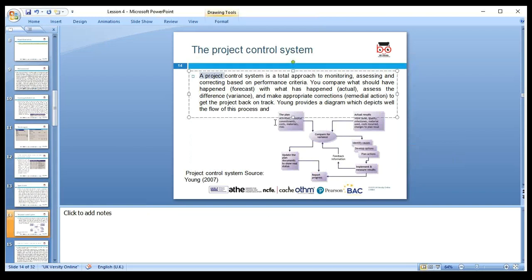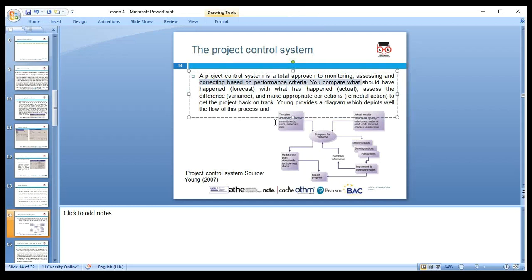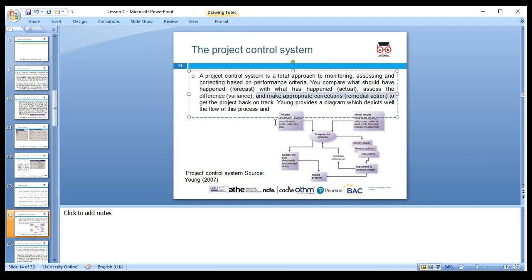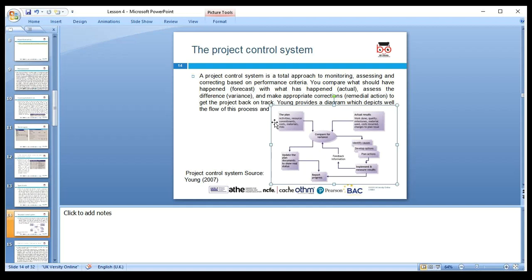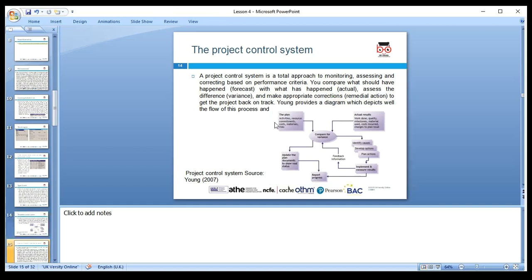The project control system is the total approach to monitoring, assessing, and correcting based on performance criteria. Compare forecast and actual results — there can be a variance. Assess the difference: why did labor cost 150,000 when we said it would cost 100,000? That 50,000 overage could be due to poor staff management or a manager not monitoring appropriately. We need to get back on track. According to author Young, we can look around the project plan, update project documents, and follow the budget and actual results — that is quite crucial and will help reduce the risk.